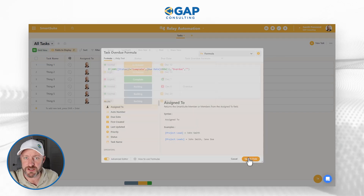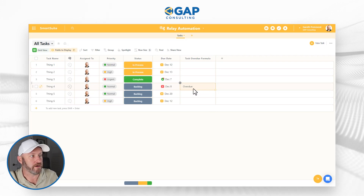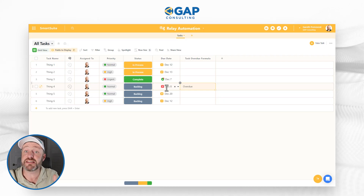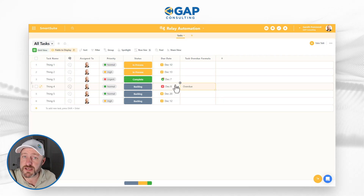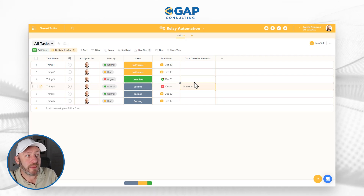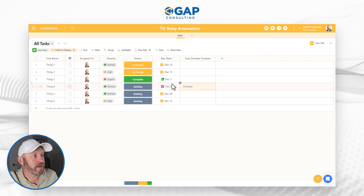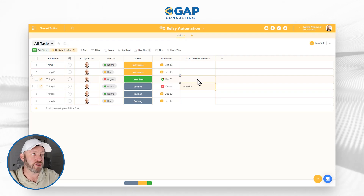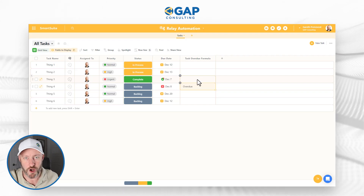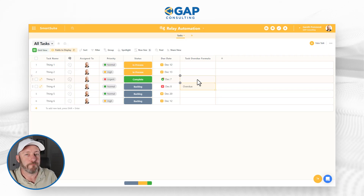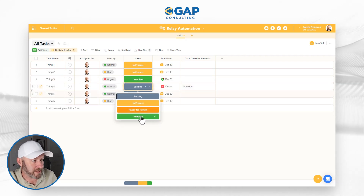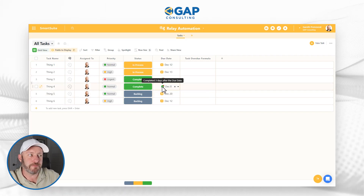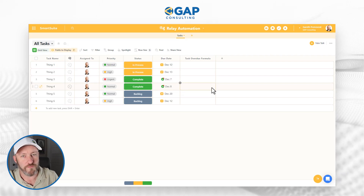You can already see it flashing 'overdue' here. This particular task is due on December 8th, and as of recording this video it is December 11th — so anything due before December 11th that is not marked complete shows as overdue. Once we move a task to complete, even if it was due December 7th, the overdue status is removed because it's now complete. This formula will be used as a trigger in our Relay automation.